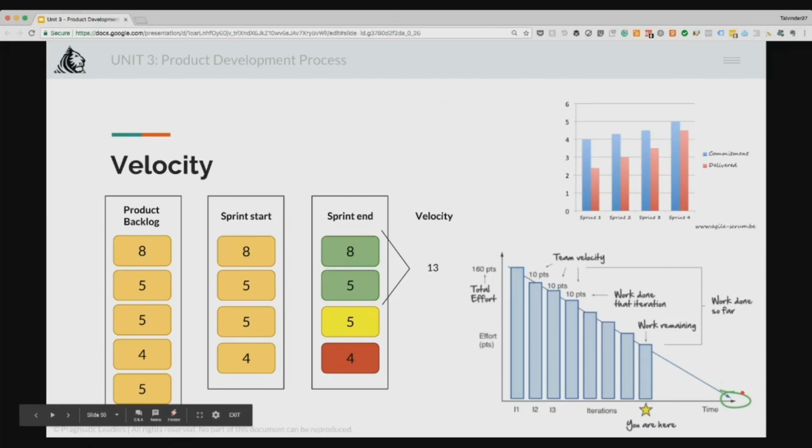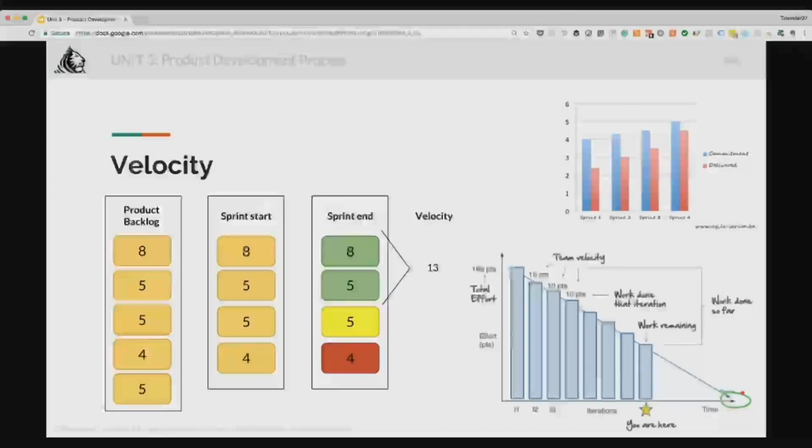Okay. Now, I think Atlassian had released a report which said that if people are committed to 100 units of work, typically 75 units of work gets done on average across all the teams that they have seen at large. Okay. And the iteration time or the sprint time, the most common sprint time is about 10 developer days. Okay, most common or most productive. That doesn't mean that everybody uses 10 days, but a lot of people actually use 10 days or 15 days.